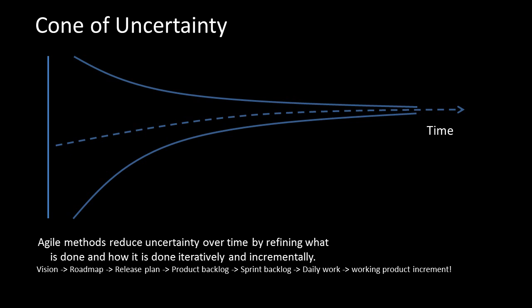So to do that, we need to understand what we need to build in the product, and we have somebody called a product owner in Scrum who creates a product backlog full of user stories describing all the features and items of work that he would like a development team to produce. So then we have our Agile development team come in and they look at the items and they say, okay, for the next sprint, the next iteration in other words, what are the items that we can build?